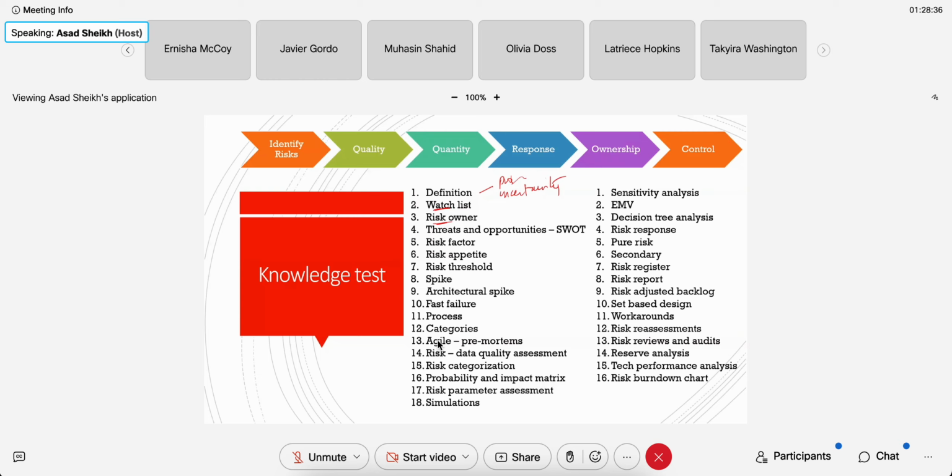Actually, you have to start from the beginning, but by the planning phase you have that risk analysis and a risk register, and then once you get into the execution phase, you are ready for anything going wrong. If anything goes wrong, the first step is to go to your risk register and see what you should do next. Okay, keep that in mind.